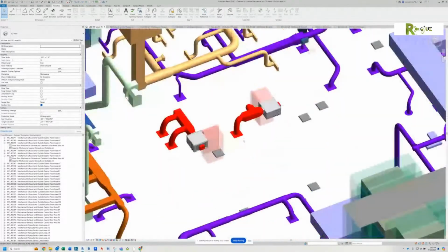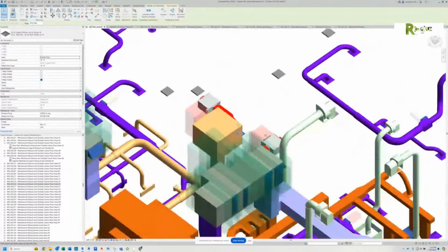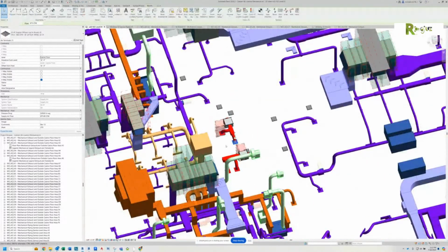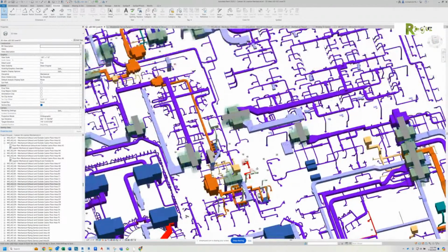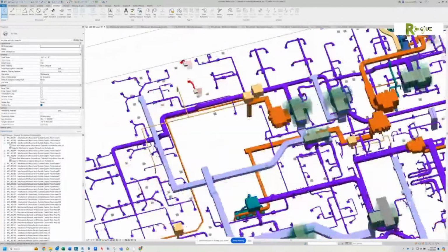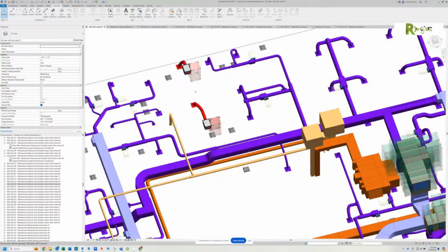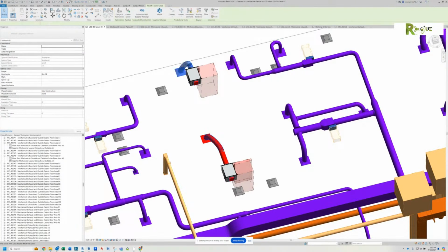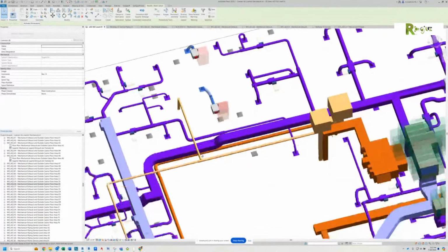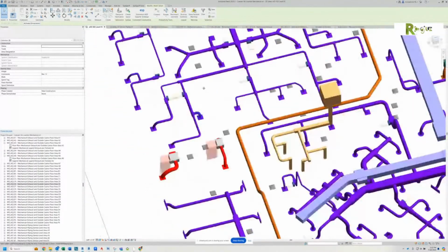Ginger, if you're listening, if Jason happens to come by, please grab him. And then this is the other stuff right here, the electrical rooms that Misty did. These are here, and then the other one is... If there was any way for you to select all the ductwork for those electrical rooms and put the trade as electrical rooms, we could tell Vortex that they need to fabricate the Starbucks and the electrical rooms.